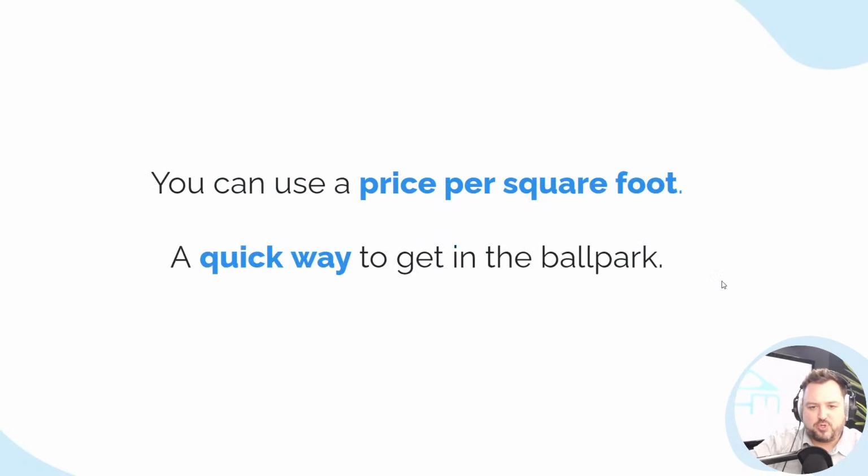You use the price per square foot. What we're saying is not the price. So most people say, well, price per square foot for tile is, I don't know, whatever it is, $10 or something like that. Well, what we're doing is we're saying use the square footage of the property. So if you're putting tile just in the bathroom, most people would say, well, measure the bathroom and then times that by whatever the cost, say it's $10, is for the tile. That's not what we're going to teach you to do.